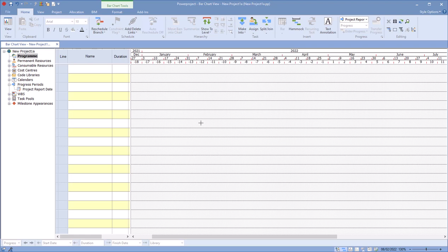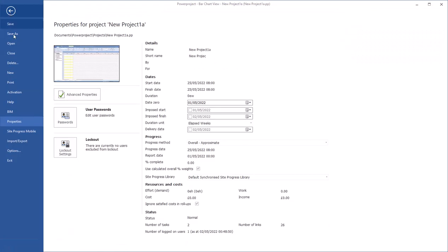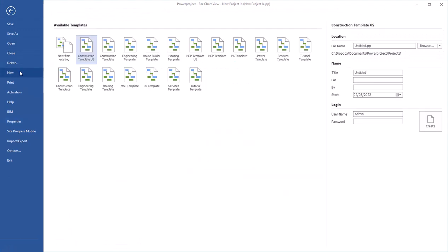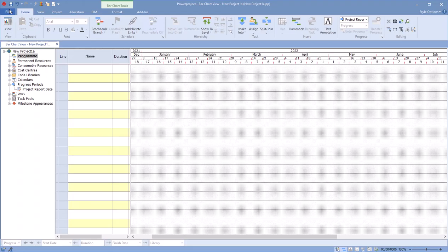When I look at going File New, any of these projects can have their own task pool, so individual to each template, individual to each project. But a task pool is a set of activities, a network of tasks, a fragment, a template of activities that you may reuse multiple times inside one project, or it may be that they're a set of predefined tasks that you'd use every time you create a project.